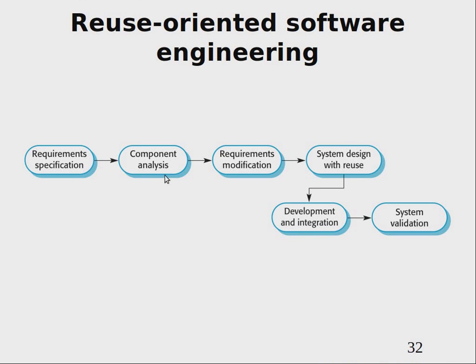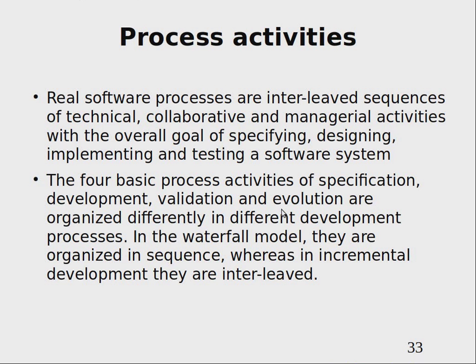And then you do this analysis of your system, then you may modify these requirements, because you may decide that these requirements need to be a little bit different, where the influence of the existing system is also considered. And then you do system design, develop it, validate it and implement it, similarly to other methodologies.